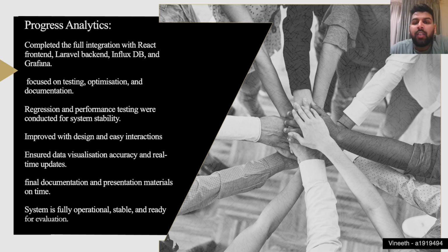Initially, our definition of done was quite basic. The feature is done when it has been coded and tested. As the project continued to develop, our DoD grew to encompass a fully deployed and accessible web UI, data correctly visualized, passing all unit and integration tests, complete documentation, and no high risk bugs remaining. This shift reflected our growth from focusing on functionality to ensuring the quality and user readiness of it. By the final sprint, done meant that it was not only working but also stable and tested.